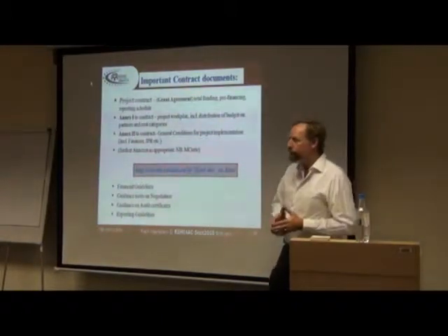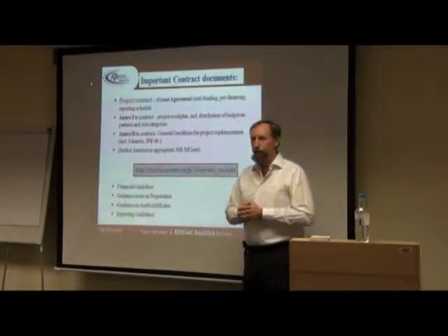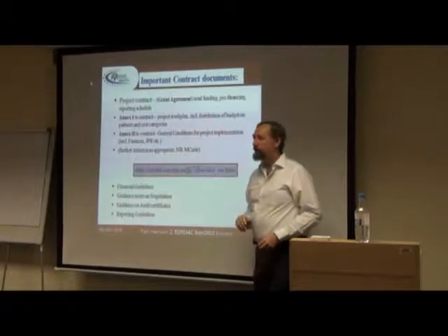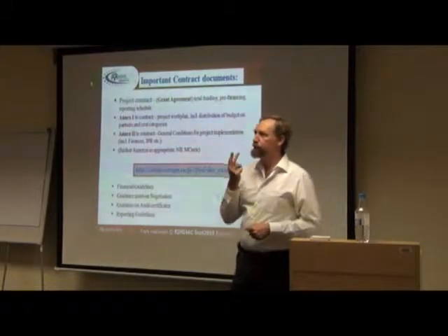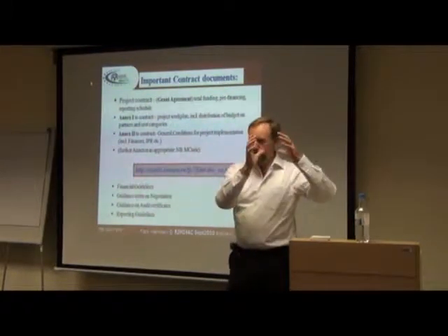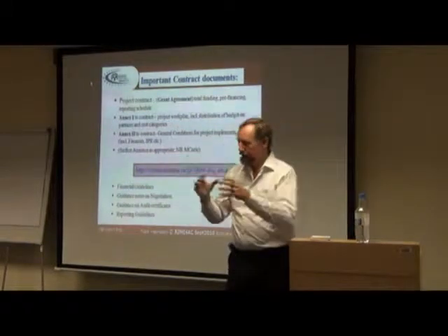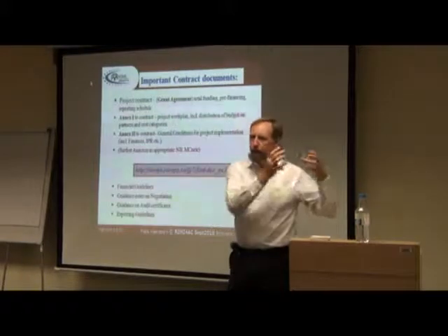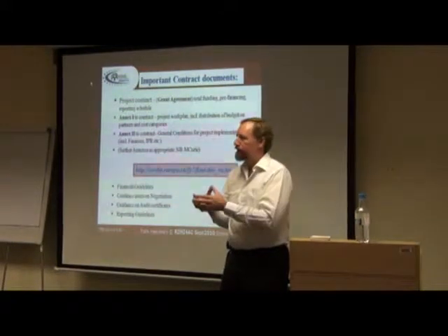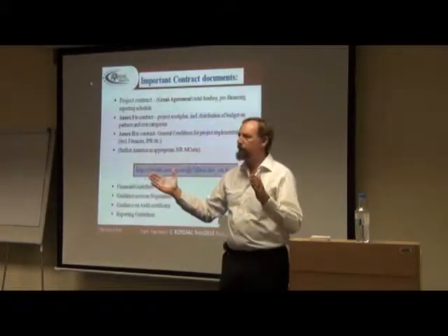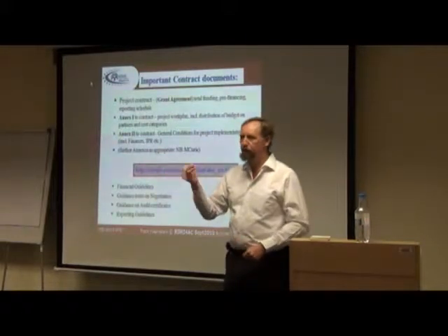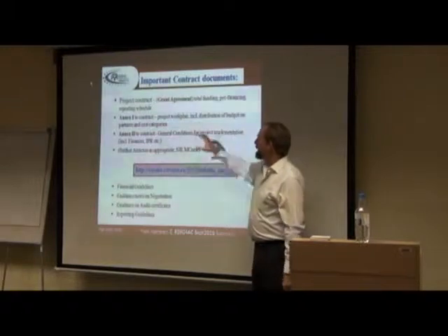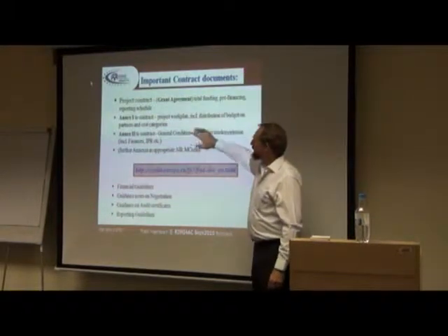I talked about contracts. Now, the contract for an FP7 project is fairly simple. The actual grant agreement, as it's called, is just 1 or 2 pages. It only says European Commission is one party, consortium and a coordinator is the other party. The Commission promises to send so much money for this project for this amount of time, and the consortium promises to deliver. Signatures, that's it. The actual detail is here.